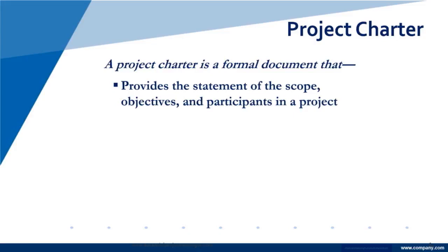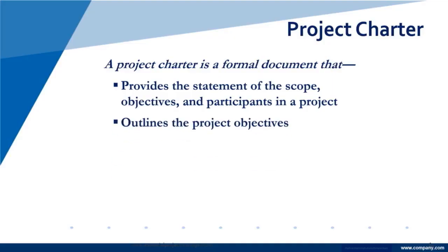For instance, if your charter says we're going to hire someone to come in, are we going to procure this service? Are we going to use somebody who's already here? Are we reassigning someone to this project? Those kinds of things. It also outlines those objectives. It identifies the main stakeholders who are affected by the project. We'll talk about stakeholder management as one of our knowledge areas in this program. Understand, identifying these stakeholders early is important, and it's formal, so you put it in writing.